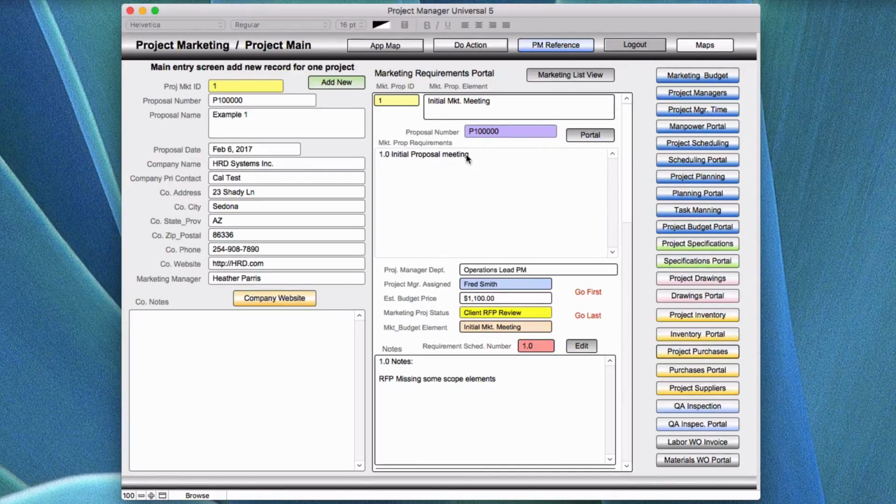and have a kickoff meeting. Kickoff meetings are where you discuss the proposal, and in some cases maybe the proposal has things that you cannot bid because you don't do that work, but they know that you have things that they feel you can do for them. So even though the proposal is identifying a lot of work and maybe some of it you do and some you don't, you can still put in a proposal for those items and also put in which ones you will not bid and which ones you will bid. You would have comments in your proposal that you send out saying, we are not going to bid this particular item. I'll give you an example.